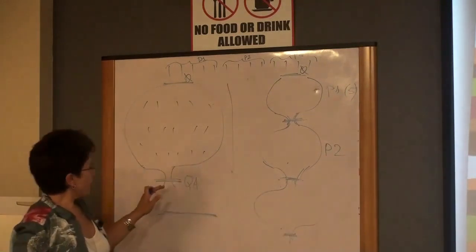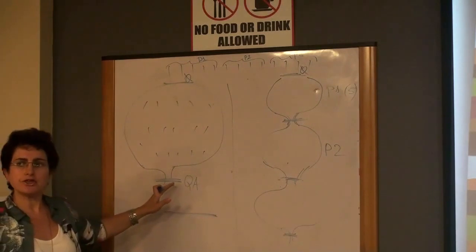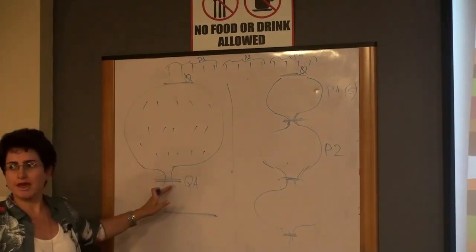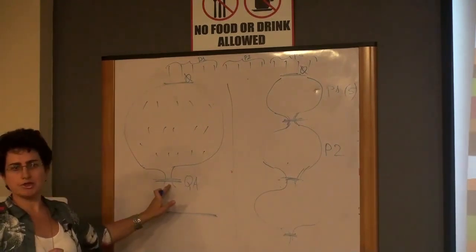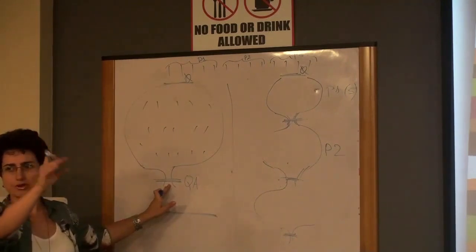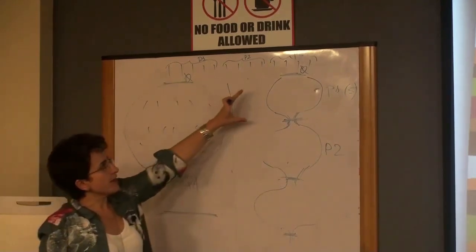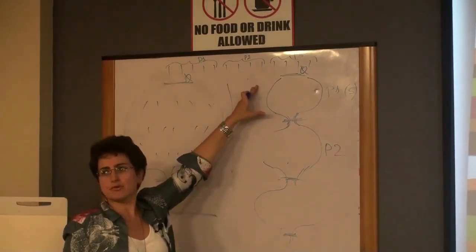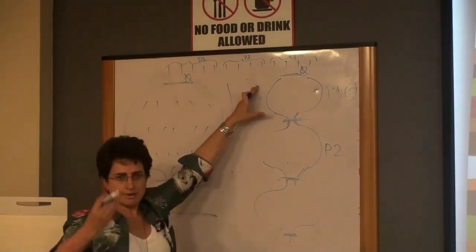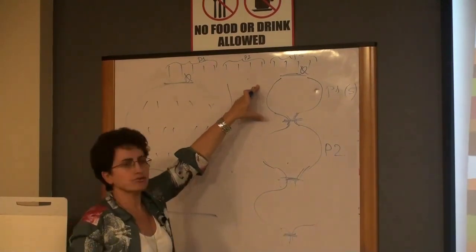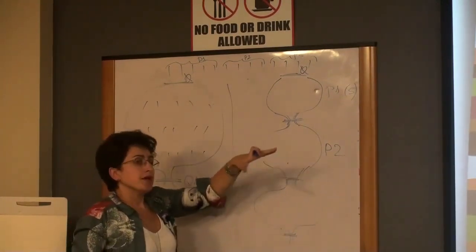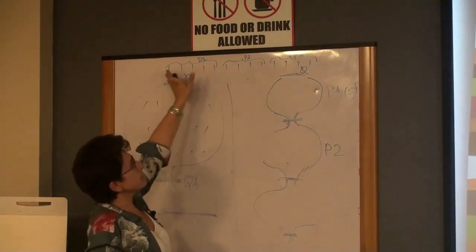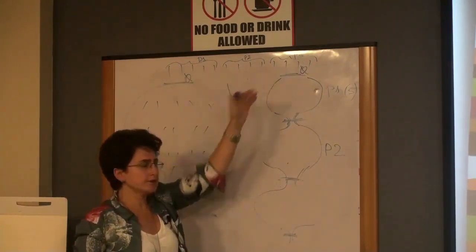So see what happens. Instead of having a potentially shippable product at the end of your development cycle, which can mean like 6 months down the road, the effort for development and testing is time-boxed. So basically, people split the development and testing effort into chunks, and they say, if you have to prioritize, this is how we prioritize our effort.